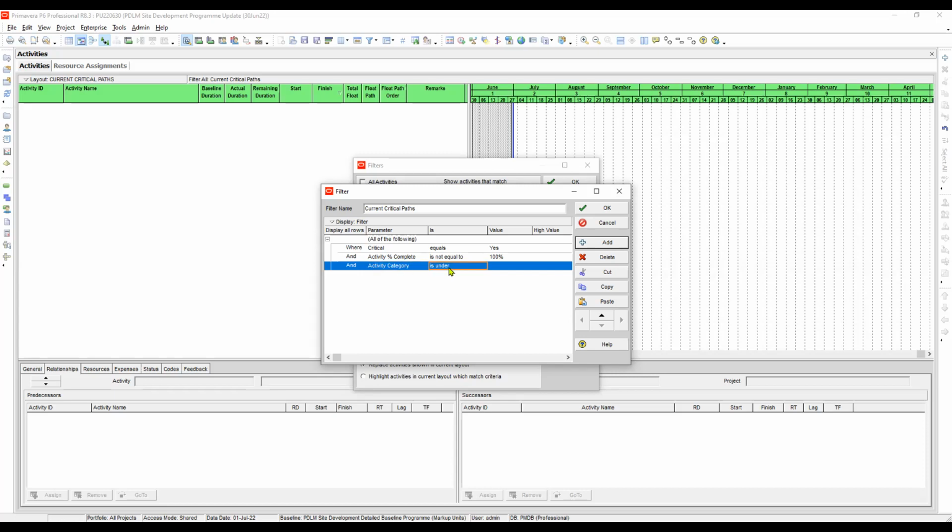So if the activity category is equal to, let's say, for example, we need a milestone, right? Not only that, we will also add more activity categories, which is equal to direct. So we need these direct activities. Indirect activities, we don't need. Delay events, we don't need. Disruption, we don't need. So we will use only the direct activities.